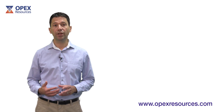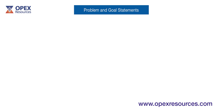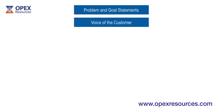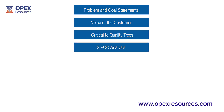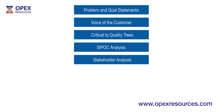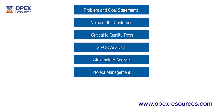Some of the tools that you will hear about in the Define phase of DMAIC are problem and goal statements, which help to clarify the problem, goal and potential benefits of the project. Voice of the customer analysis and critical to quality trees, which help you to understand who the customers are and what they need from the product or service. SIPOC analysis, which is a tool for defining and understanding the core process involved. Stakeholder analysis and project management tools that can be used to establish how the project and its stakeholders will be managed.